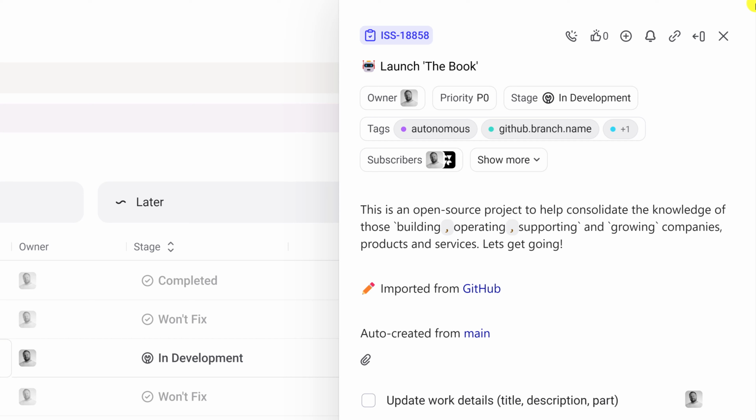And so for developers, for those people that are working primarily in Git or an SCM platform, why not just allow them to create branches, push to GitHub, do PRs, do their reviews, merge their code, push it to CI/CD? And that's one of the very, very valuable things about this GitHub integration. So you can see I didn't manually create this at all. The system automatically created this for me based upon a new branch creation.